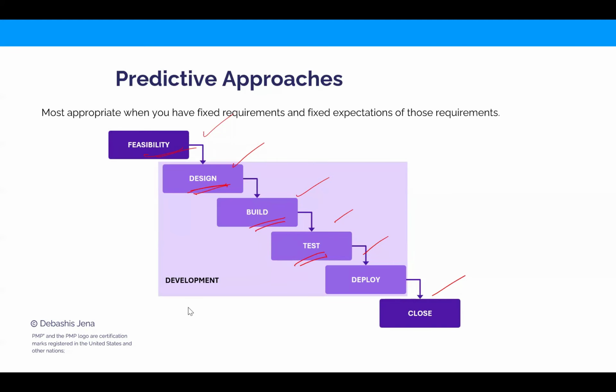Okay, I'll take the next question on chat from Ismail. What is the point of getting feedback on each release when doing incremental? Ismail, feedback is more applicable in iterative and least in incremental, very less in incremental, much more in iterative. That's the goal. Will the feedback be incorporated somehow on that release or just taken into account for the next one? For the next one is fine, very clearly. So we are taking feedback to incorporate in the next release. That's how we improve the product.